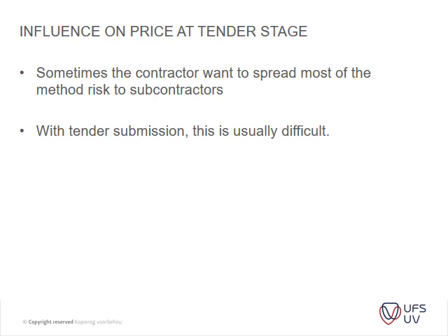With tender submissions, it is usually difficult because your subcontractors at tender stage don't usually give the main contractor a method statement. Maybe your electrical engineer might do something like that, or your mechanical engineer might assist with that, but there's usually not enough time to actually do that.